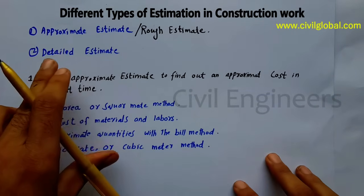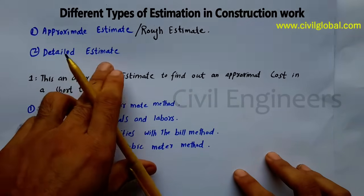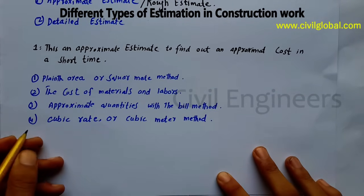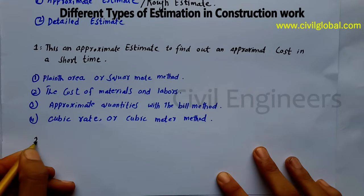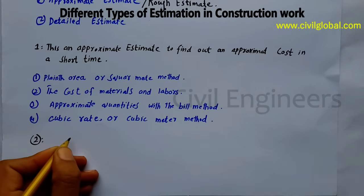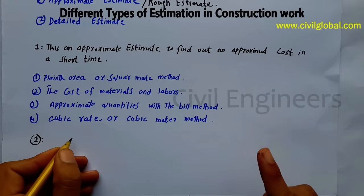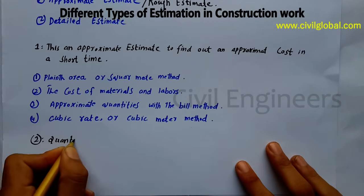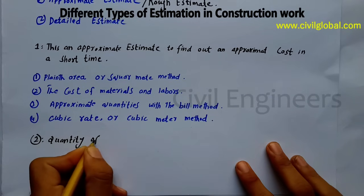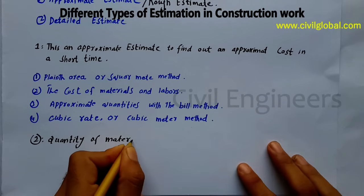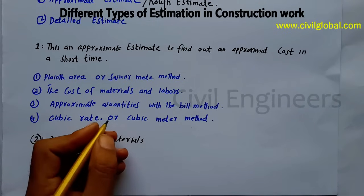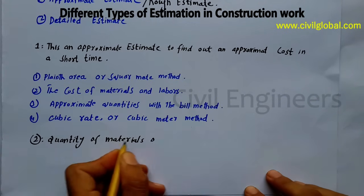Now the second type is the detail estimate. The detail estimate is defined as: the quantity of all items of work are calculated from their respective dimensions. Simply stated, the quantity of materials of work are calculated according to their respective dimensions.